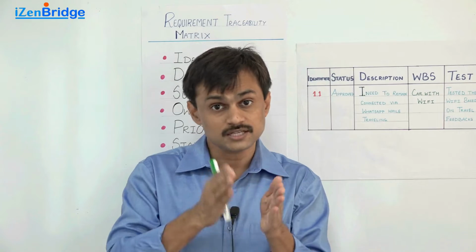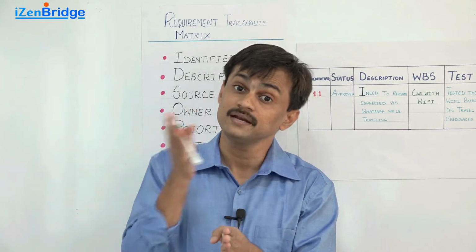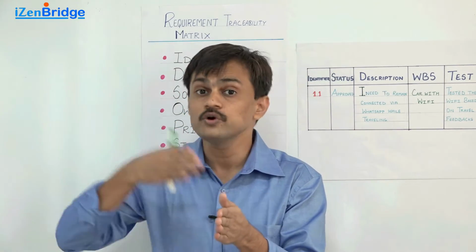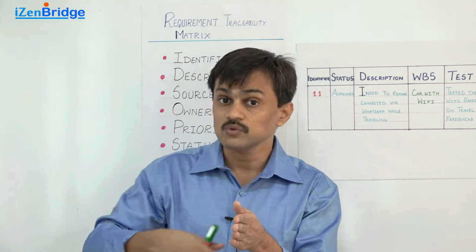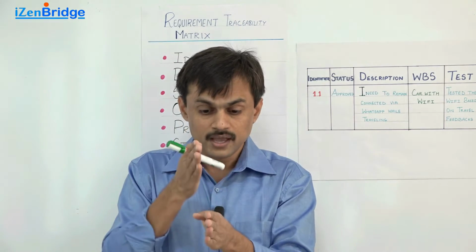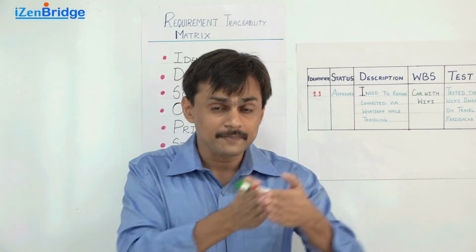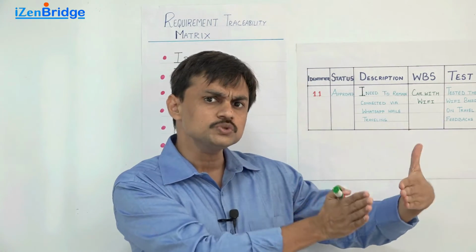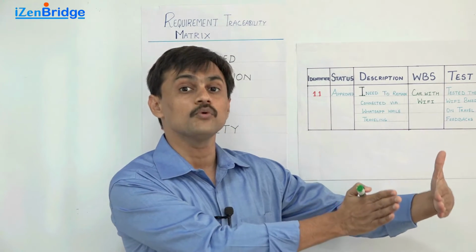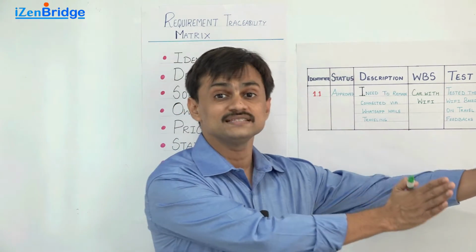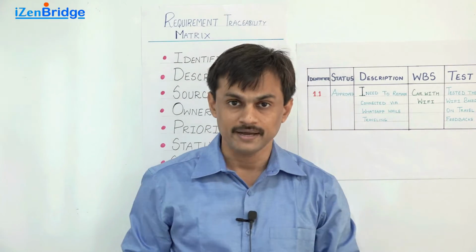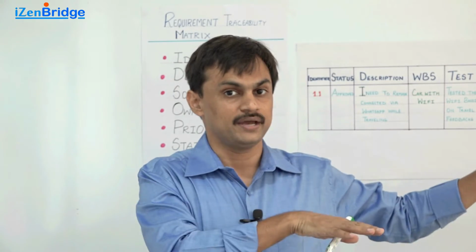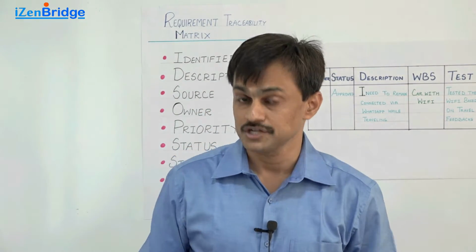It also gives some more traceable information for the requirement itself, from where it is originated. You can talk about who gave it, when it got discovered, what was the business case behind it. So it's a requirement. And after the requirement is there, what happens next? How did it get converted into scope? What work breakdown structure item is working, which particular component is satisfying it, and where that component is getting tested and where it is getting implemented. So it's like a left and right traceability of the complete requirement, provided by the requirement traceability matrix.